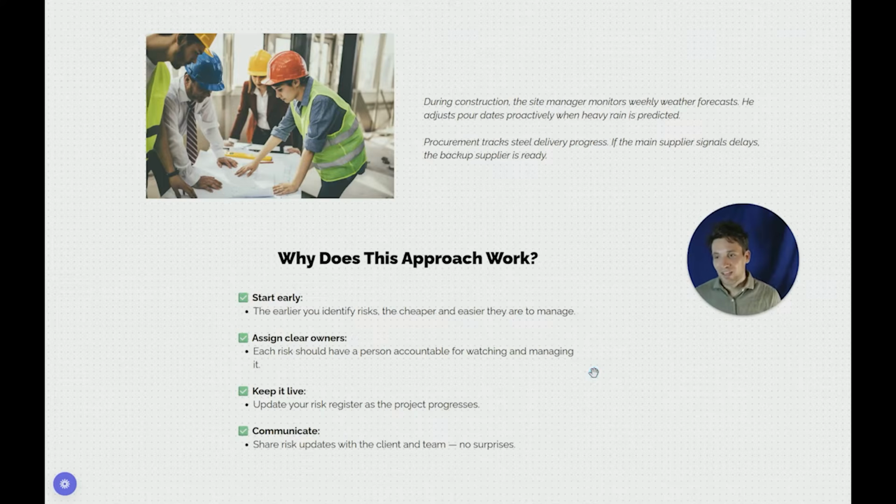Okay, so why does this 4-step approach work? Well, it ensures we start early. The earlier we identify the risks, the cheaper and easier it is to manage them. It's a consistent concept in construction management that the earlier we address an issue, it's generally much cheaper to fix.